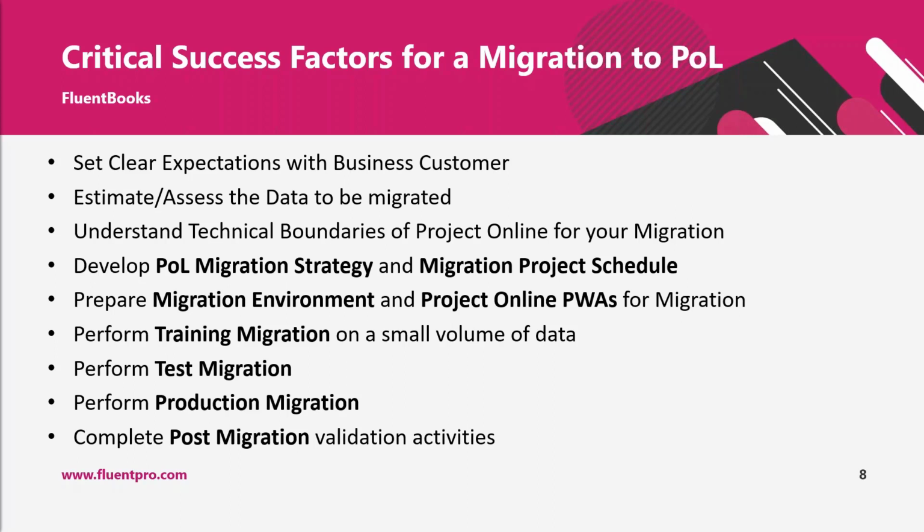And as a first step, we recommend performing a training migration: take a small volume of data, like PWA configuration, several projects, several project sites, and migrate them to a test PWA, just to get the understanding and the feeling of the migration process itself, to understand how to go through wizards, what parts need to be monitored, and what parts do not need to be monitored.